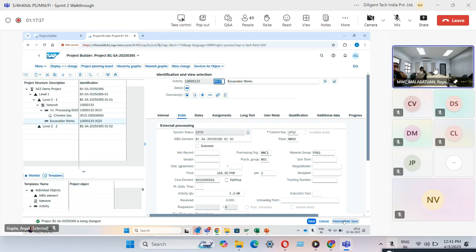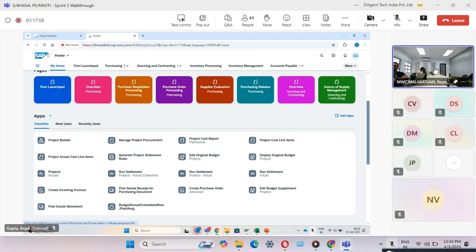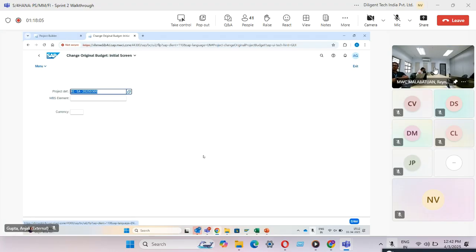Based on this project, we're going to place the budget, which is going to be out of SAP, out of a product system activity. That budget will be assigned by the project financial controller to the project. To assign the budget, the project financial controller is going to use a different application, added original budget, and it will automatically populate the project definition we were editing.